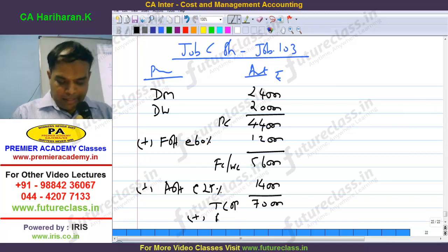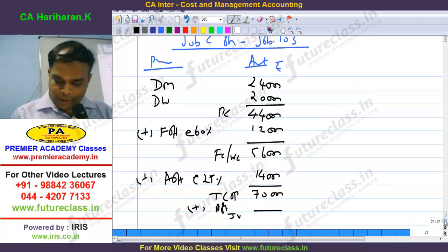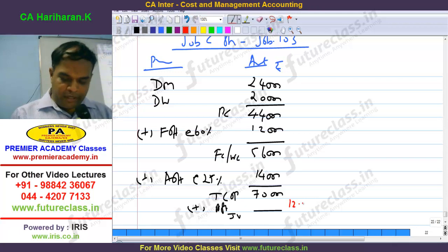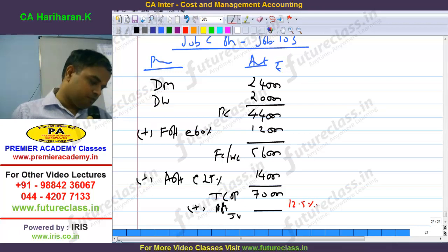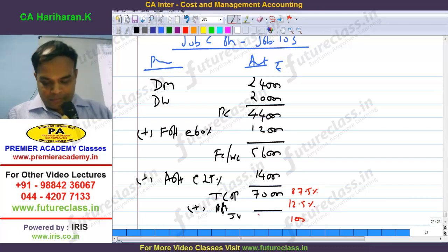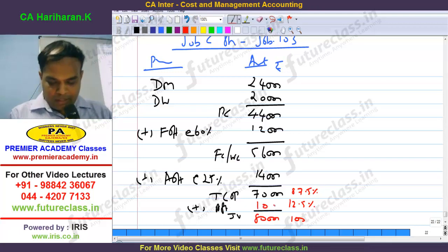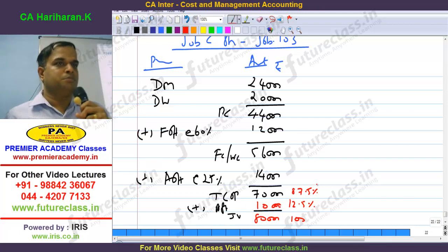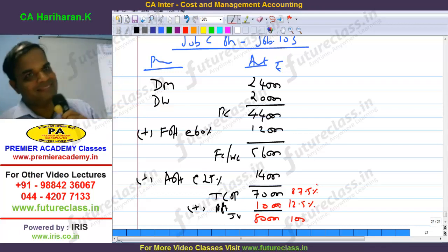70,000. Add profit is equal to job value. How much is the profit? 12.5% on what? Selling price. Selling price, and 12.5. Therefore, cost is 87.5. We changed everything around in many exams. Got 80,000. Fast.